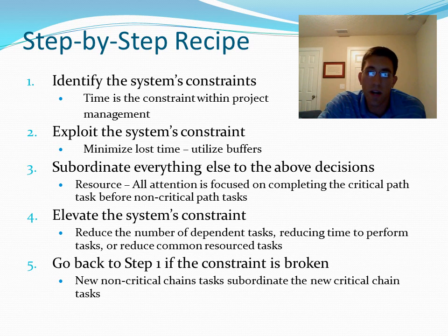Step 3 is to subordinate everything else to the above decisions. We're going to use resources within the resource buffers to focus all attention on completing the critical paths before the non-critical paths. So that means stop everything you're doing to finish the critical path tasks.